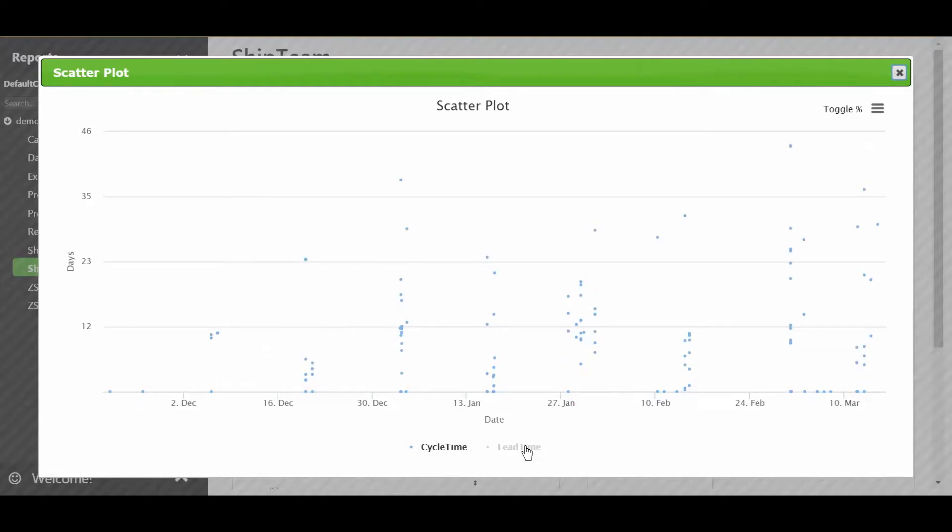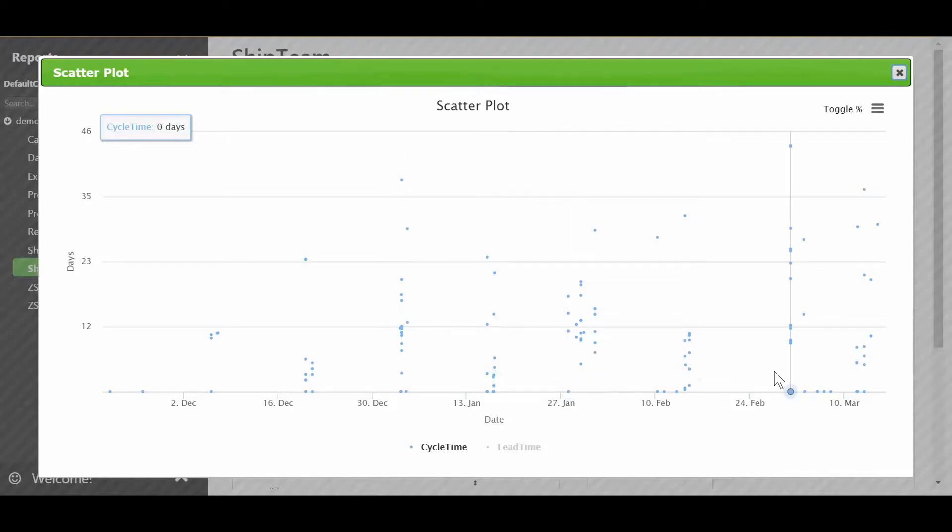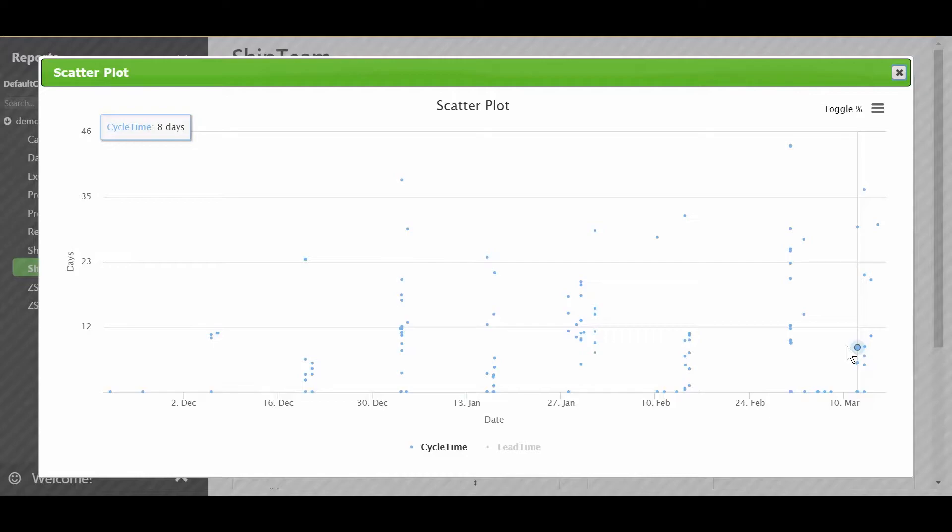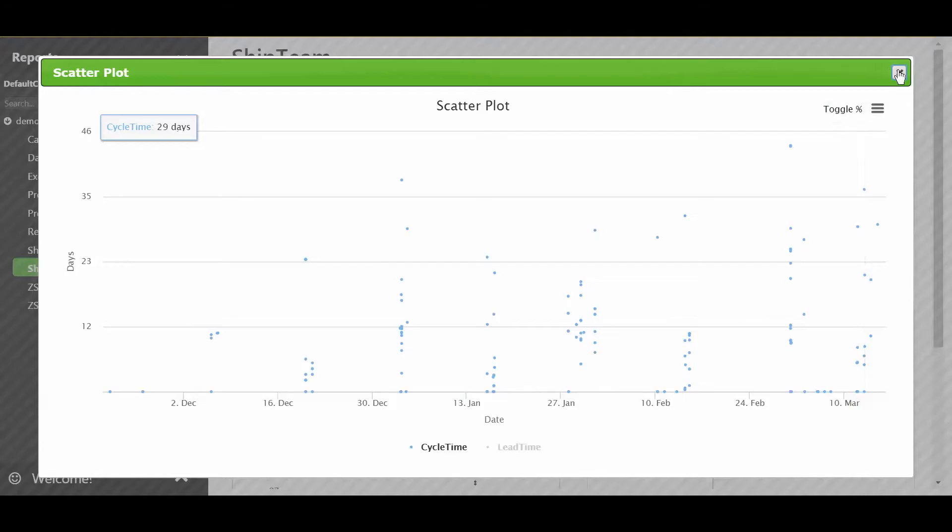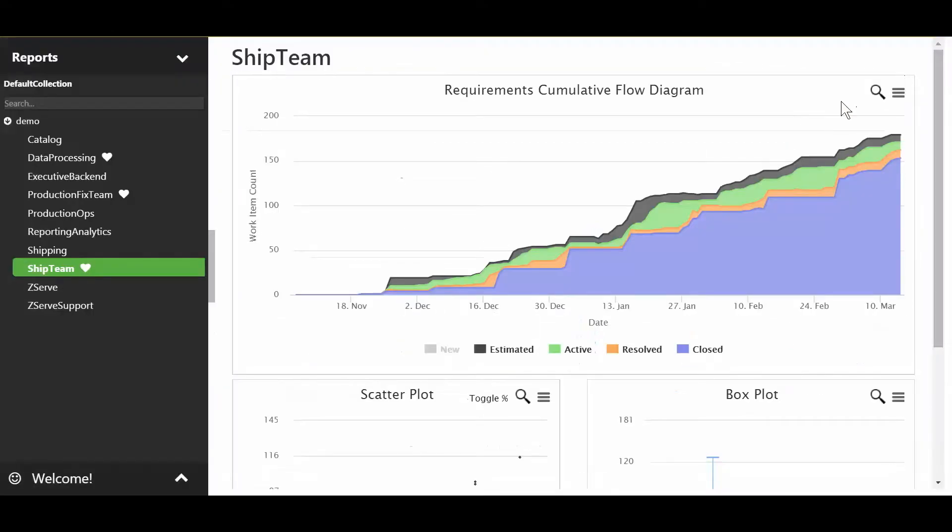Now this team, you can see, has delivered right at the very end of a sprint in almost most cases. But they've started to split this out and deliver more regularly in later sprints. Now what this is indicative of is a maturing scrum team that now has found that instead of all the development staff working to the very end and then throwing things over the wall to the testers, even if they're on the same team, they're working together more collaboratively and getting things early to the testers. Let's take a look and see if that bears out in our cumulative flow.